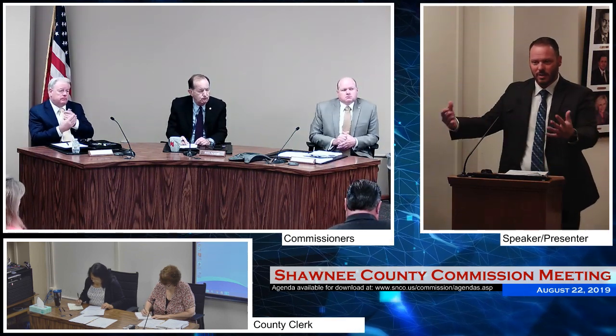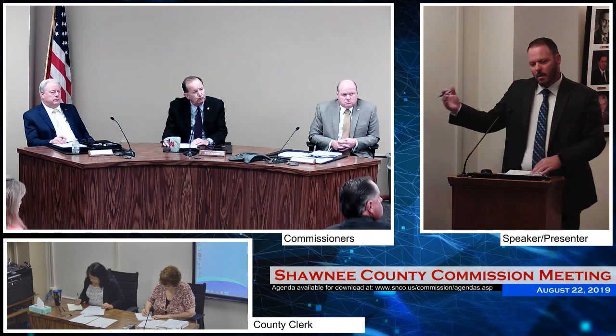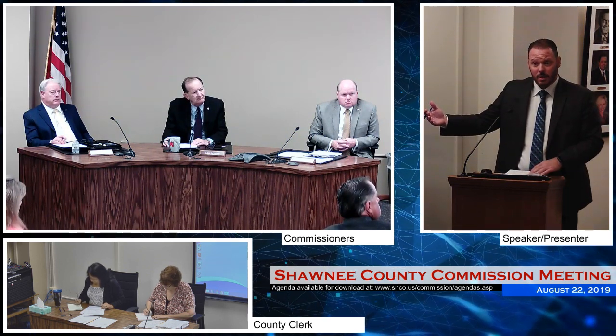Because we're discussing whether to use design build, the board this morning needs to make a decision as to whether that's the most appropriate construction delivery system for this project. So what's a construction delivery system? There's 3 basic types, and the traditional type you'll see through our public works projects, where architects and engineers get together, they design the project, and then they send it out to contractors and say, please give us a bid for what it's going to cost to build this street, this bridge, that type of item.